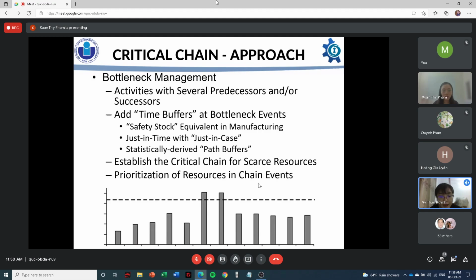The buffer can be used as a highly effective measurement tool for controlling the project schedule. The projects are linked to the constraining company resource using buffers, which consider factors such as activity duration variability. The method aims to modify and improve the behavior of the project team, enforce early reporting of activities, and eliminate multitasking.